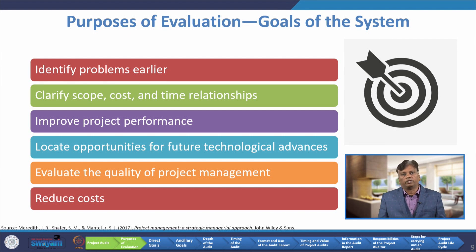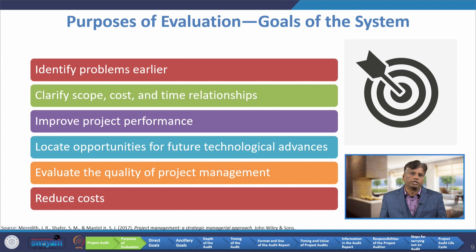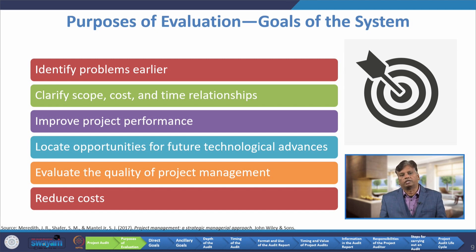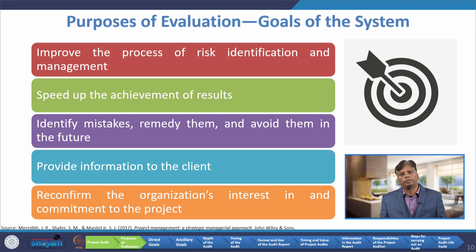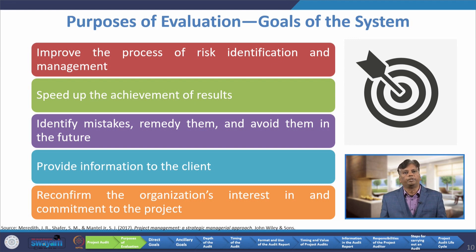The purpose of evaluation or audit — here we use audit and evaluation interchangeably — includes: identify problems earlier, clarify scope, cost and time relationship, improve project performance, locate opportunities for future technological advances, evaluate the quality of project management, reduce cost and improve the process of risk identification and management, speed of the achievement of results, identify mistakes, remedy them and avoid them in the future, provide information to the client, and reconfirm the organization's interest in and commitment to the project.